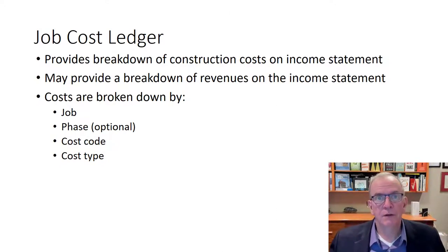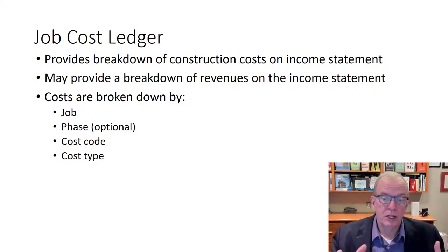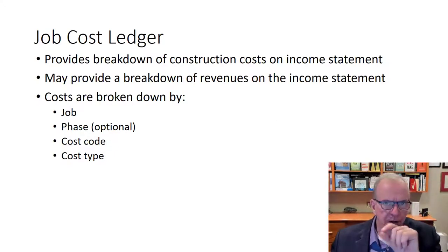So you have to have enough sales to cover the overhead for the year, and then have a target amount on top of that for profit. What is that amount you're trying to achieve? We also mentioned in an earlier lecture that you had better have a bit of a management reserve for the unknown unknowns that may happen on your projects, so there's a little bit of contingency allocated there.